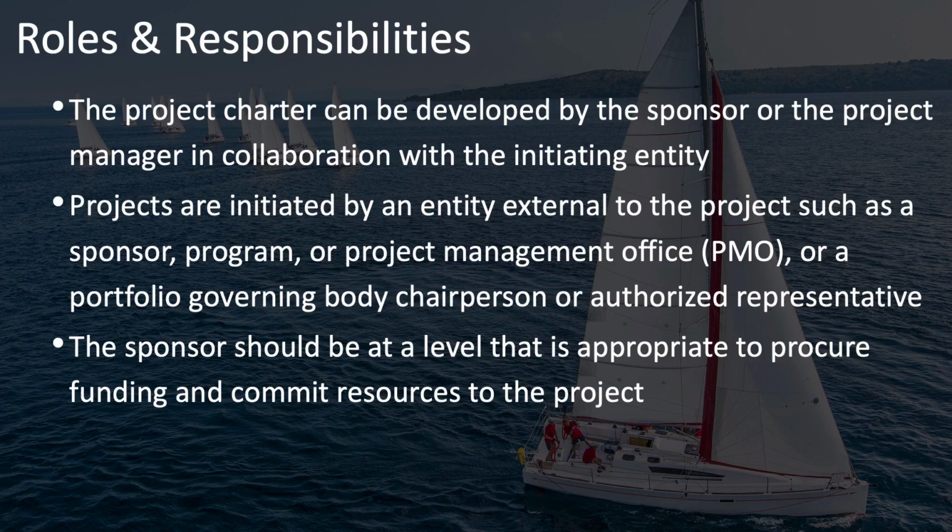Another important aspect of the roles and responsibilities relative to the project charter is that the sponsor should be at a level that is appropriate to procure the funding and commit the resources necessary for the project. Does the project sponsor have sufficient authority within the organization to allocate or acquire the people and the resources that you'll need for the project? Is the sponsor high enough up in the organization? If not, you need to find someone who is.